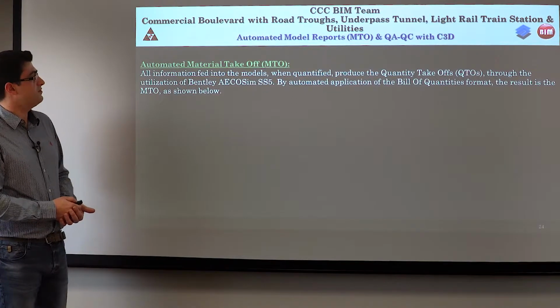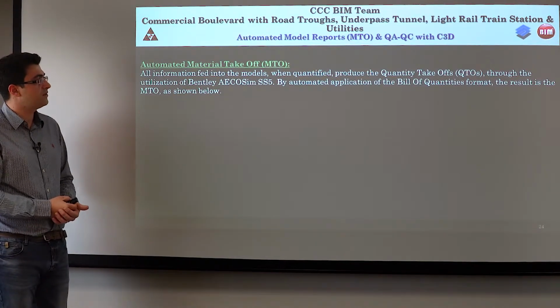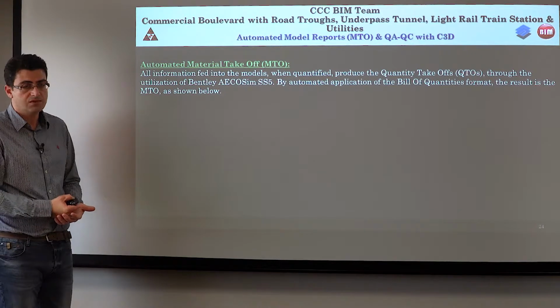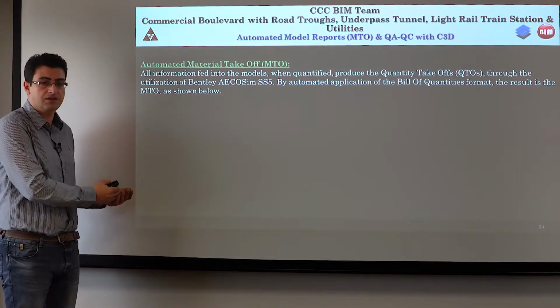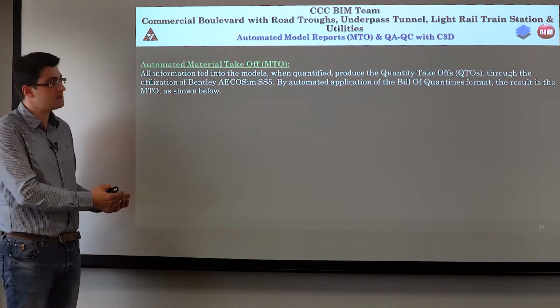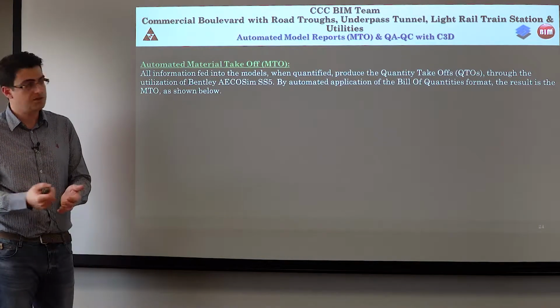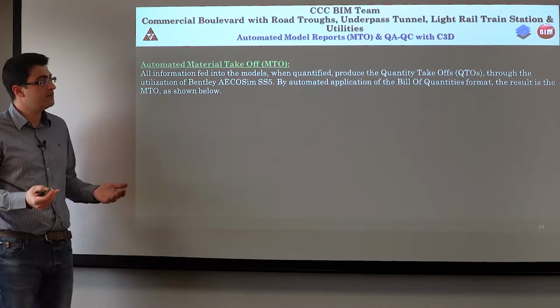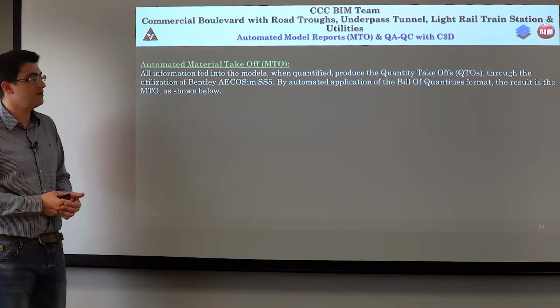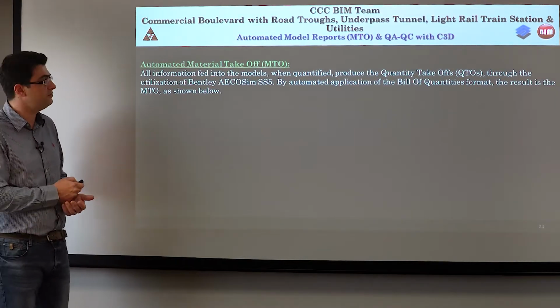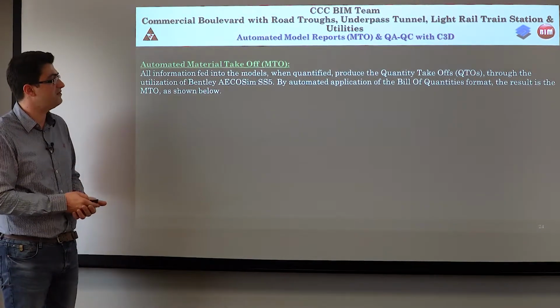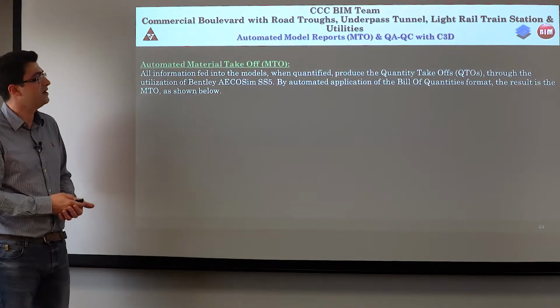Moving on, all information fed into the models when quantified. The civil models, structural elements, waterproofing elements, and the MEP elements for the networks. All these provide the quantity takeoffs through the utilization of the platform of Bentley EcoSim SS5 revision for V8i.